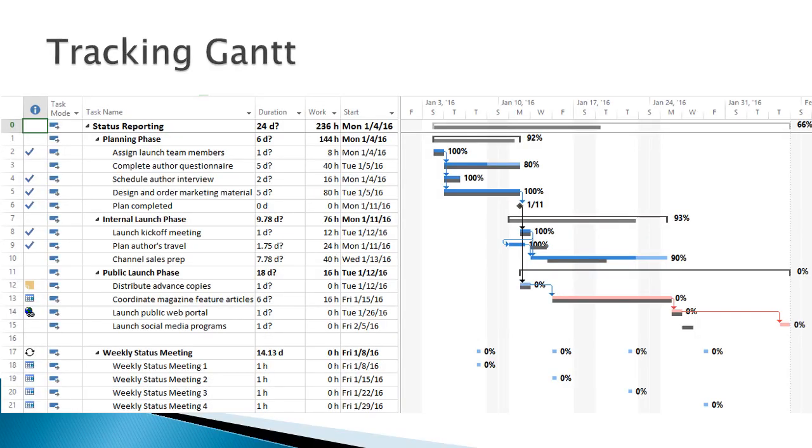From the Task tab, if we drop down the Gantt chart function, we can see that Tracking Gantt is one of the views. Select this to get a good visual of the tasks. The top bar indicates the baseline, red for critical, blue otherwise. Unless you changed the formatting, this is the default. The lower bar indicates the actual progress. This way you can visually see the tasks that started later or took longer than planned to complete. As we saw in the previous segment, we can filter the view to just the tasks of interest.